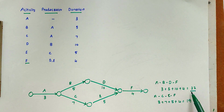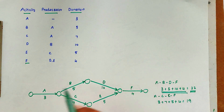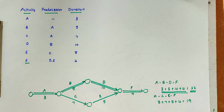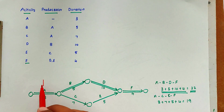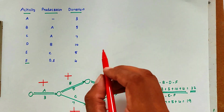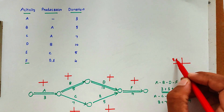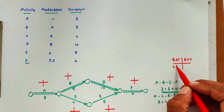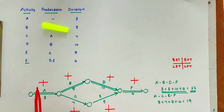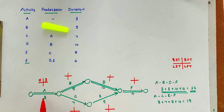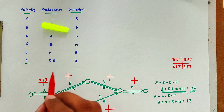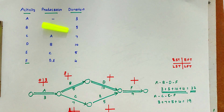The path containing the maximum duration is called the critical duration and critical path. Path A–B–D–F with duration 20 is therefore the critical path. Now we can find the EST, EFT, LST, and LFT. We place the EST on the left and EFT on the right of each node. Starting at 0, node A: 0 + 3 = 3.